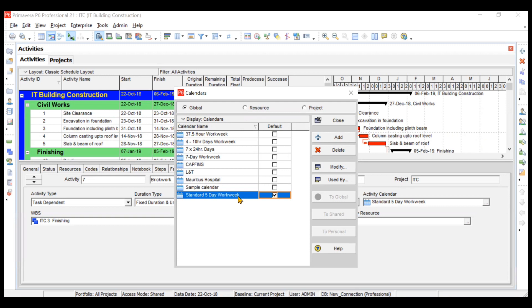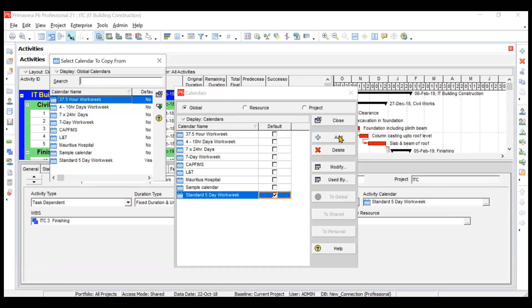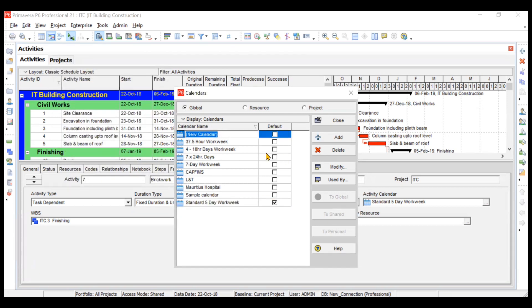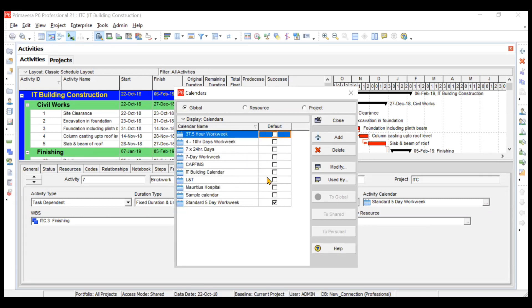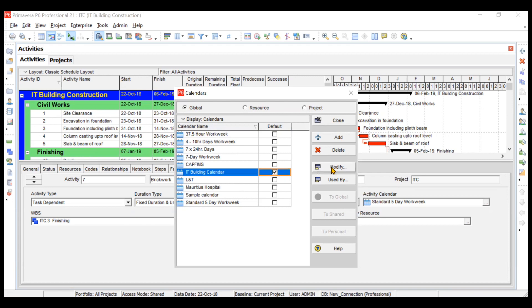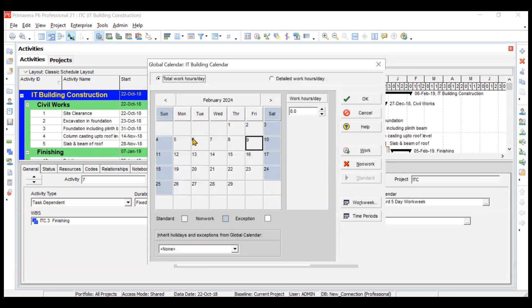The standard five-day work week has Monday through Friday working, with Saturday and Sunday off. We will modify this. Select the calendar you want to use as a base, then click Add, click Select, and name our calendar 'IT Building Calendar.' Then select it and click Modify.